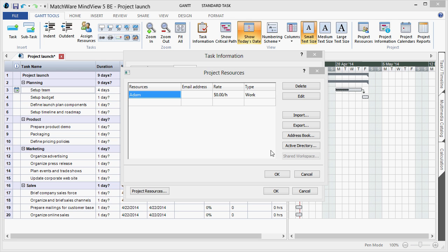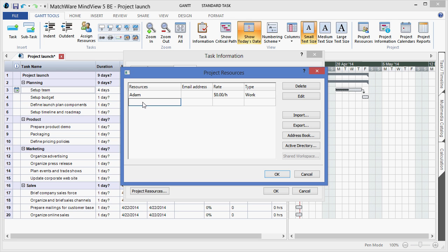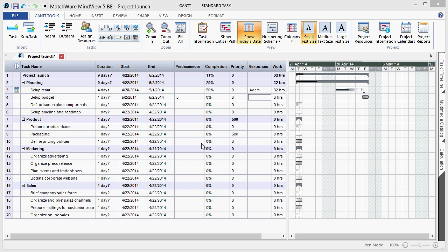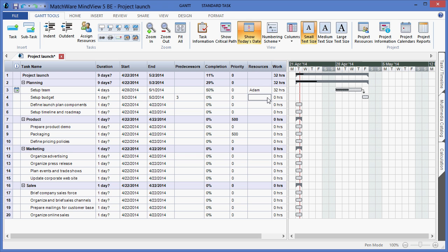For this example, I will simply type in an additional name. Once I have entered the resources into the resource list, I can simply left click in the resource box and select that resource from the drop down list.